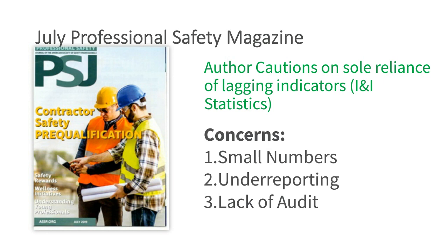Number one is that in many cases contractors are small, and one event may significantly skew their overall performance. So looking at numbers alone, and I have a slide that illustrates that next, may not be the very best way to evaluate it. Certainly there's a concern about underreporting of information from contractors.